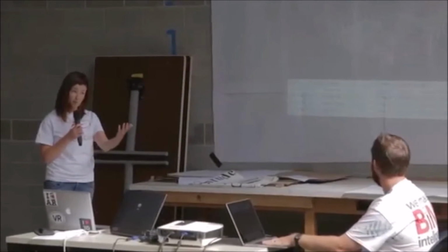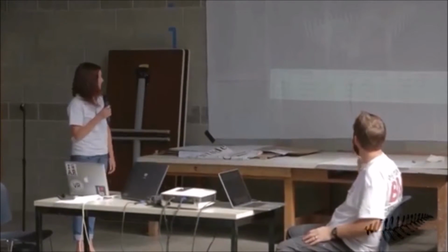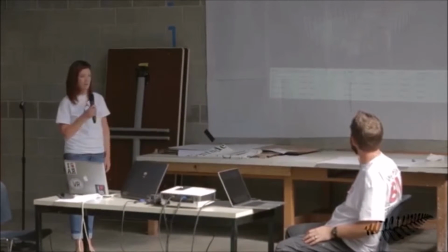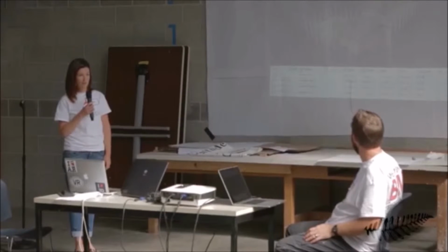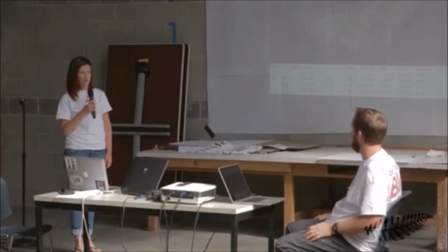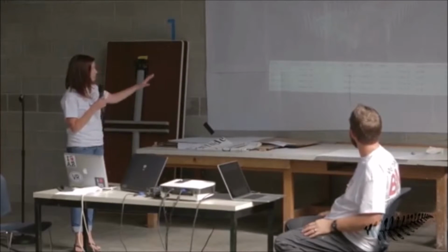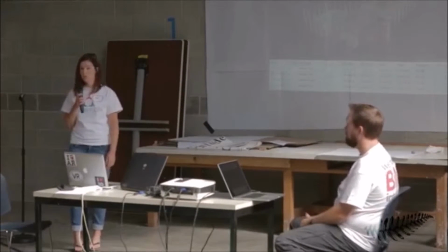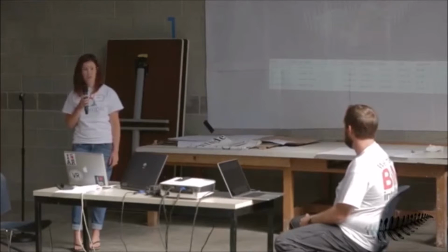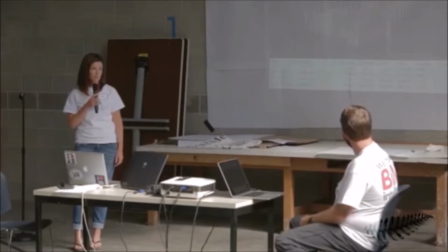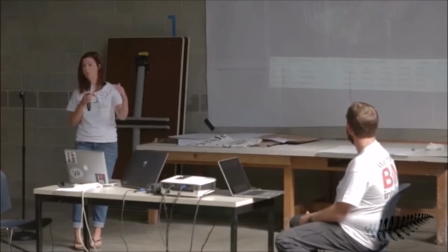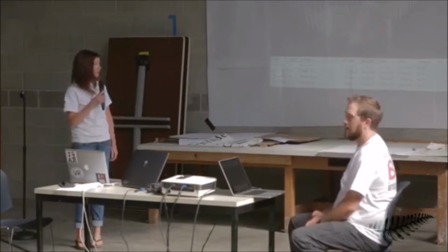Oh, the next aspect. It's not real obvious because it's a little bit washed out here, but we're showing the critical items in an off red, and the other items in a little bit of a shaded model color. That's right, and the components that are gray are those that have not yet been assigned to an activity. They're automatically color coded by whether they're critical, non-critical, or unassigned.